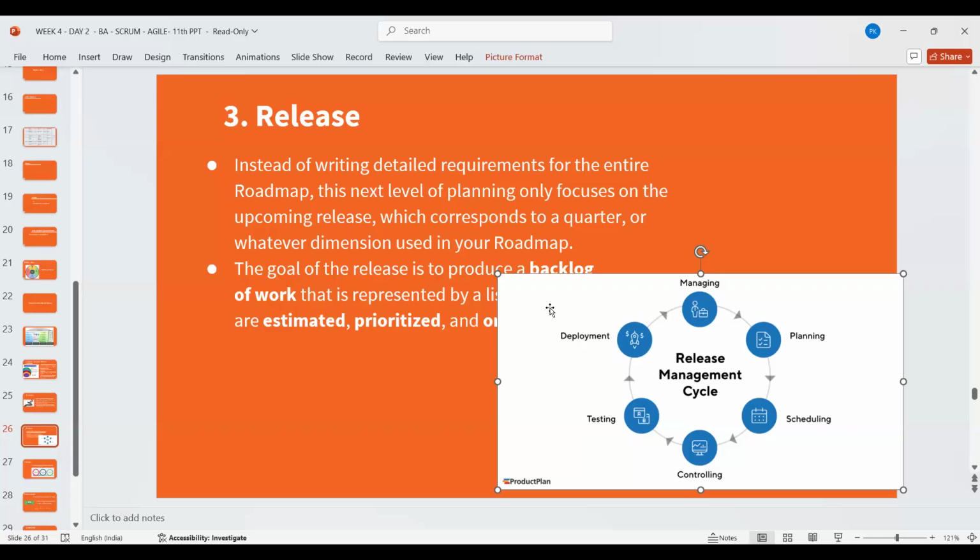Or sometimes what happens, the testing fails, and in my current operations team, we check for all the features that are being completed or not. So in that, we found some of the functionality is not working as per the planned process, or as per the expectation. Then we don't give a sign off. Then because of the sign off failure, the release doesn't go. So trust me, it is more common than it sounds, and it does happen. I'm not saying it's a daily affair, but yes, many a times, even when everything works fine, everything is picture perfect, but your release doesn't happen.